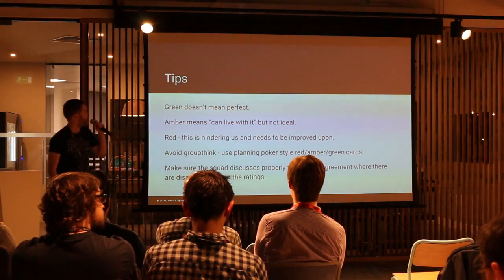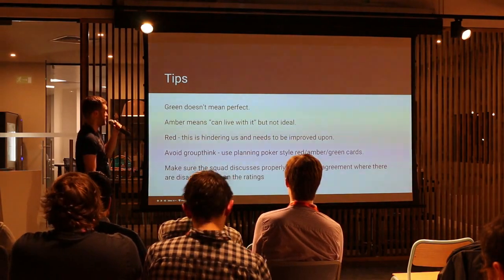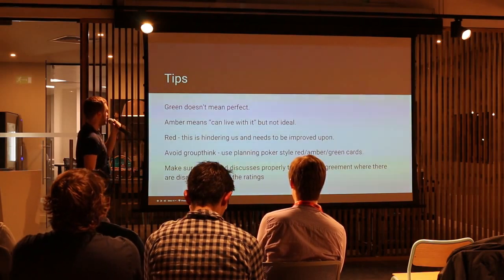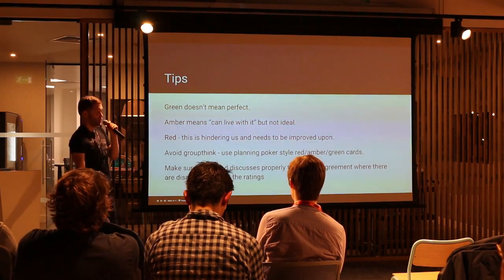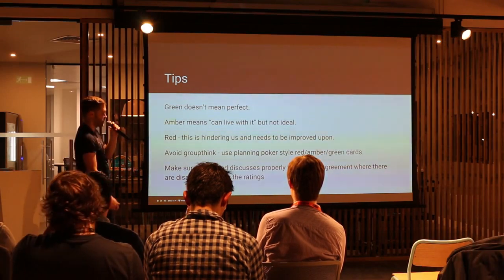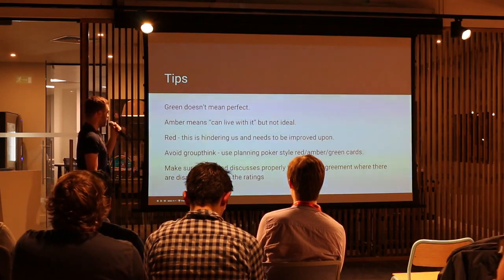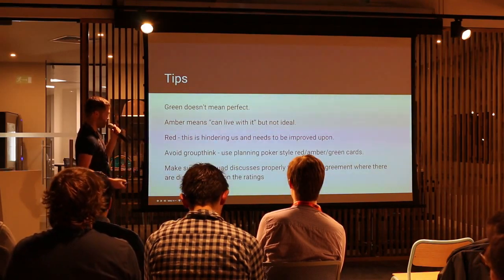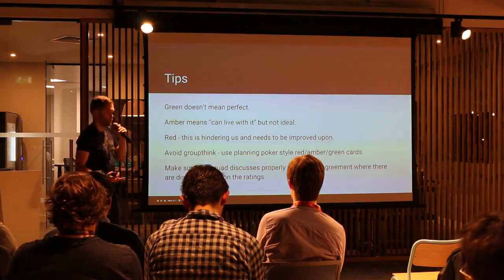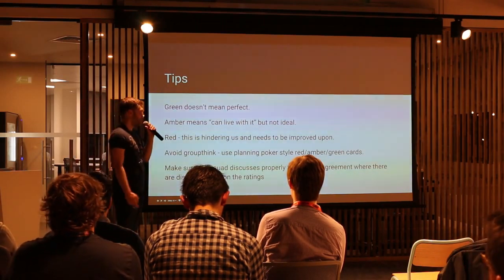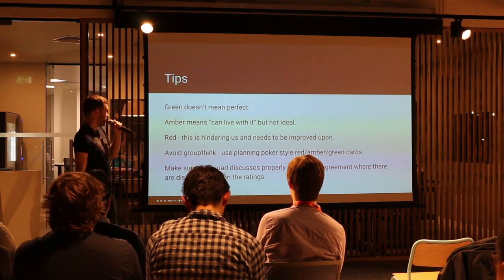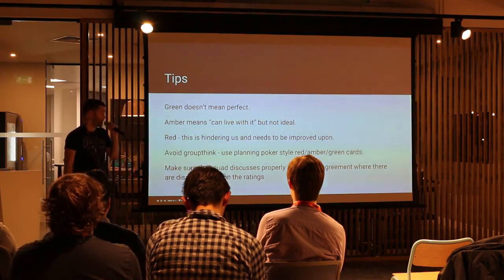A few tips: green doesn't always mean it's perfect — otherwise we wouldn't be able to do continuous improvement. Amber means we can live with it but it's not ideal. And red is something the squad definitely needs to be focusing on resolving. Use a planning poker-style voting approach to avoid groupthink and to avoid the strongest or most vocal members of the squad directing the discussion. Make sure the squad discusses properly and reaches an agreement where there are any disagreements in ratings.